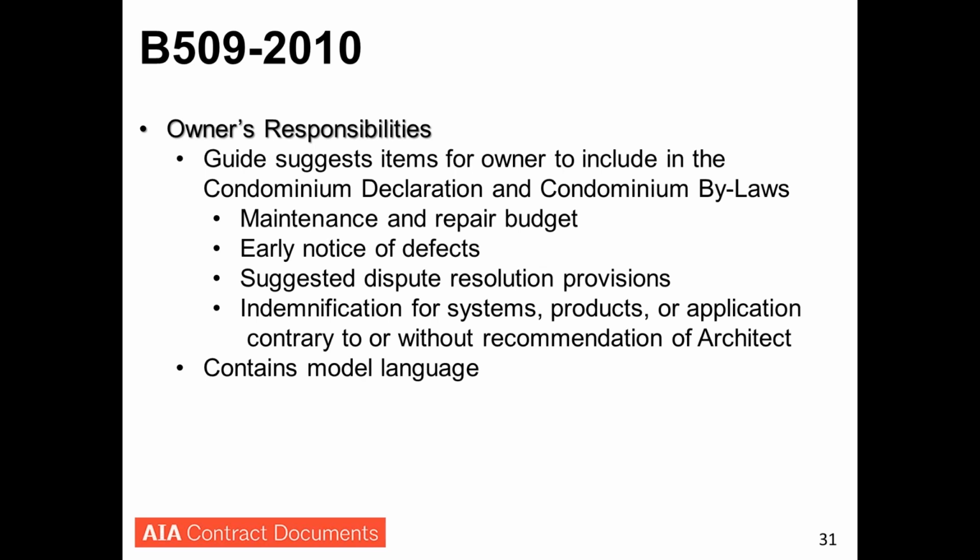And then the last one, indemnification against systems or products that get substituted, right? We all encounter this in practice. You very carefully research what you think is the right building envelope system, and lo and behold, something else gets installed through the magic of value engineering or whatever. And if they do that, specific language can be inserted in the contract that indemnifies you